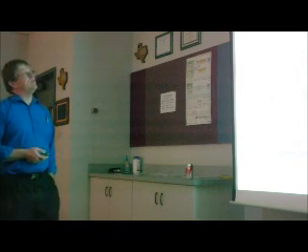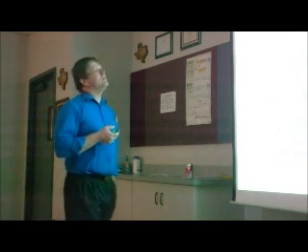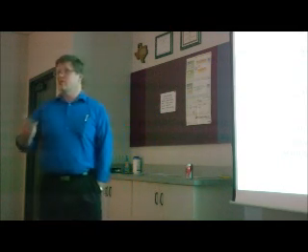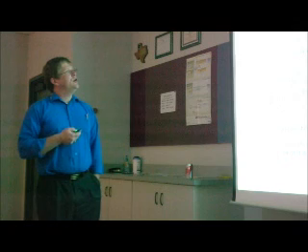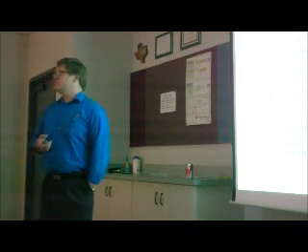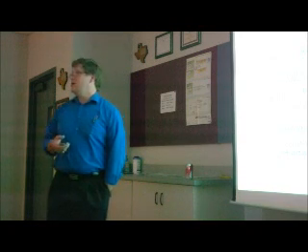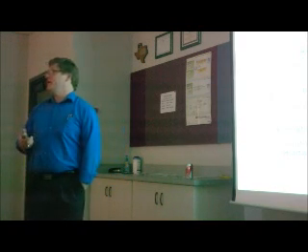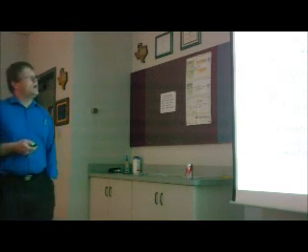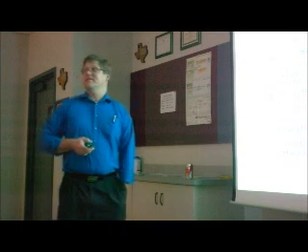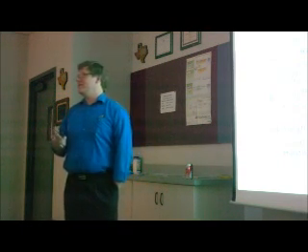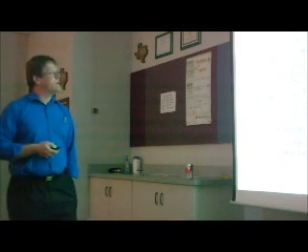As far as the general outline for a request for proposal, you need to give them some kind of background information about the organization: what you do, what you sell, what your requirements are, things like that. Your network requirements, choice of possible network designs. Again, they may propose an alternative. And if it's something that they do all the time, maybe their alternative is better. Maybe they can do more with less, so to speak. Your service requirements: is this something you have to have up and running in the next 90 days? Because if it takes them a year to do it, it's probably not going to work very well.